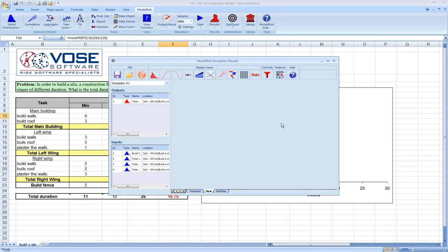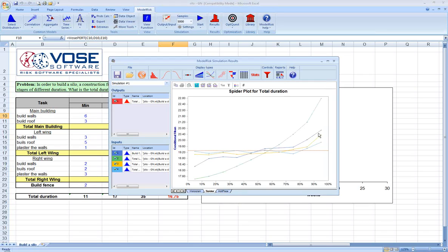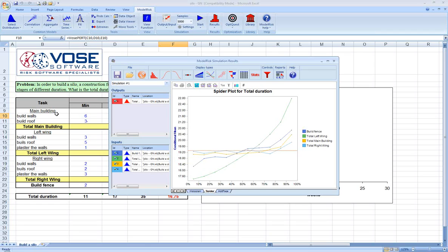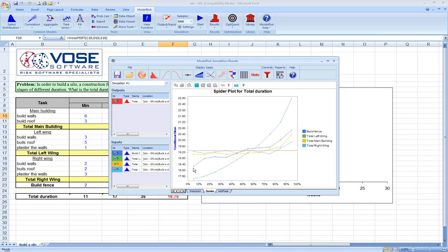Another interesting piece of information in project risk analysis is called sensitivity. In ModelRisk, a very nice feature for building sensitivities or understanding sensitivity is a spider plot. What a spider plot does is essentially tell you of the inputs in the model—we've designated as inputs the total time for the main building, left wing, right wing, and fence—which is driving the largest amount of variability in the result.